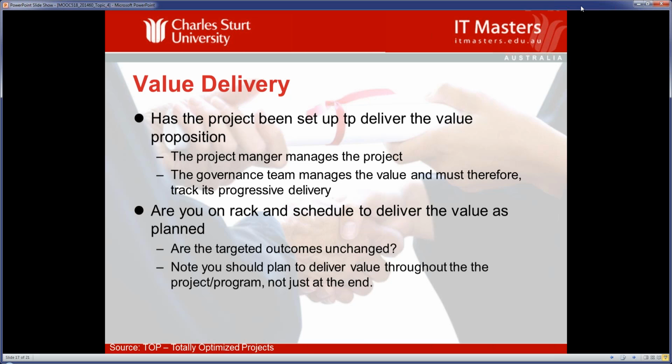So when you're structuring a program of work, where can you start getting value? When can you start banking some dollars? Because it certainly helps when you get into the high-risk projects. You try and tackle the risky bits first and you try and get some value straight away. A simple example of that could be when you're redoing some processes or simplifying processes or optimizing processes so that they can then be embedded perhaps into a technological platform, you can already bank on the process changes. So already people are starting to use things and start thinking about things differently and starting to add value. You can measure that and start banking it as you go through.